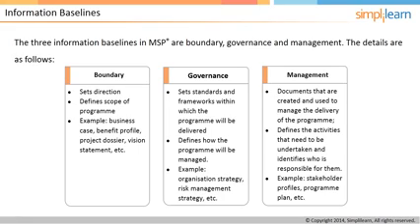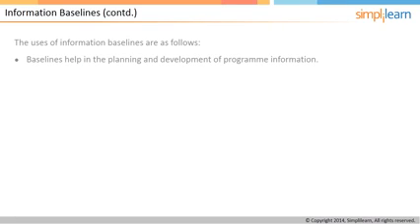All governance baselines are implemented by a management baseline. For example, risk management strategy is implemented by a risk register, and so on. In the next screen, we will continue our discussion on information baselines along with their characteristics.